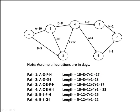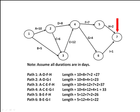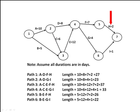Now let's look at the longest path — it's path 3. It follows nodes 1, 2, 3, 4, 5, and then 7. The work activities are A, C, E, F, and H. Adding all the durations of these activities, the duration of this path is 37 days.